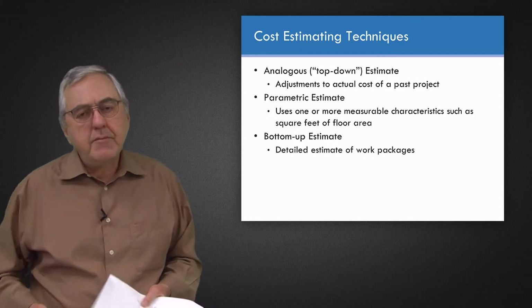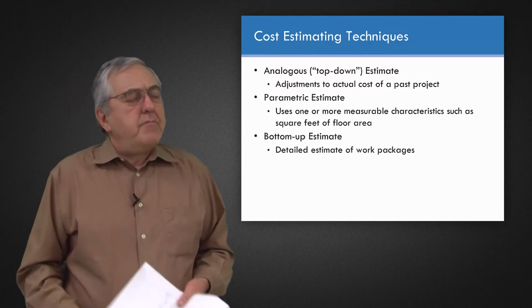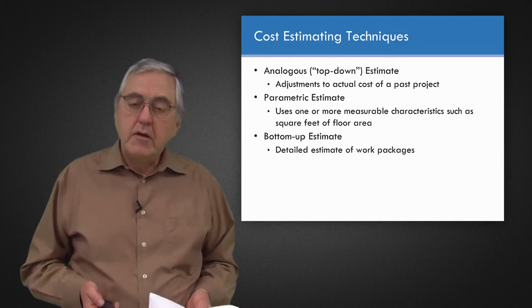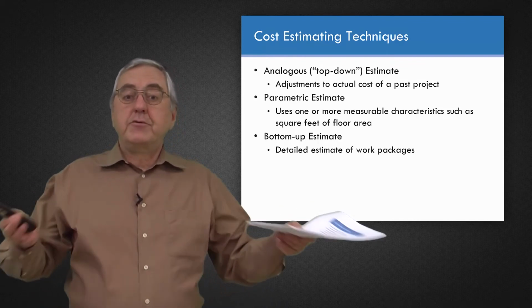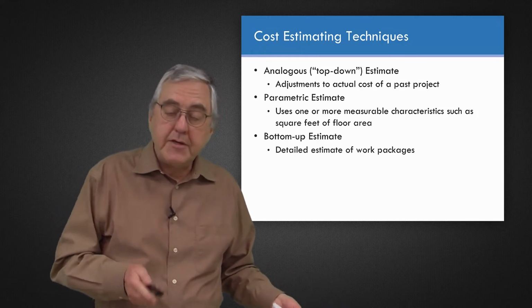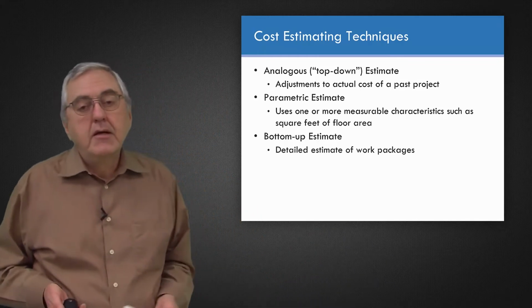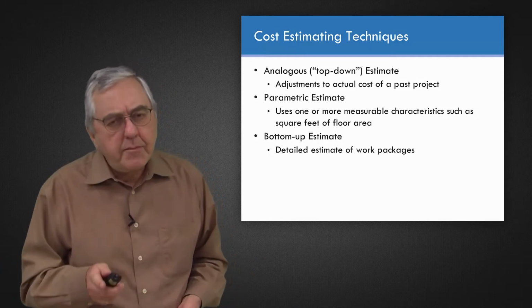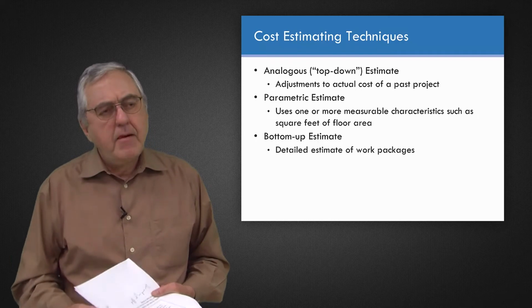Now, a couple of things to say about the bottom-up is it can be very dangerous to try to do a bottom-up estimate unless you do have a good description of the project. If you're not sure what all the work packages are, don't try to do a bottom-up estimate because there's work you're going to miss.